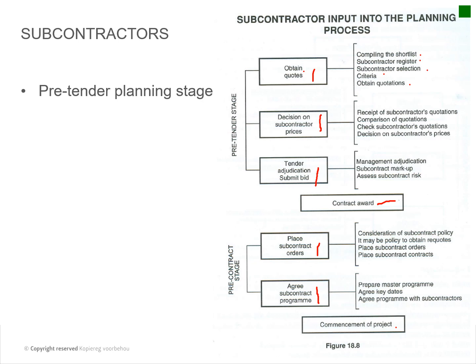Yeah. So if it's a large tender, then the main contractor will actually send tenders out to their subcontractors. But if it's the smaller or medium-sized contracts, they get quotes for certain things to do. Yeah, it's like a selective. The contractor selects their own contractor.